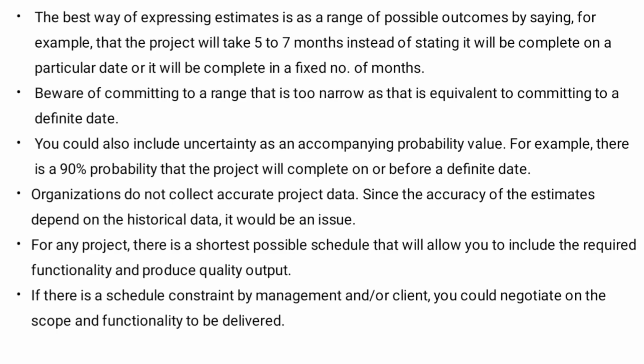For any project, there is a shortest possible schedule that will allow you to include required functionality and produce quality output. If there is a schedule constraint by management or client, you could negotiate on the scope and functionality to be delivered.